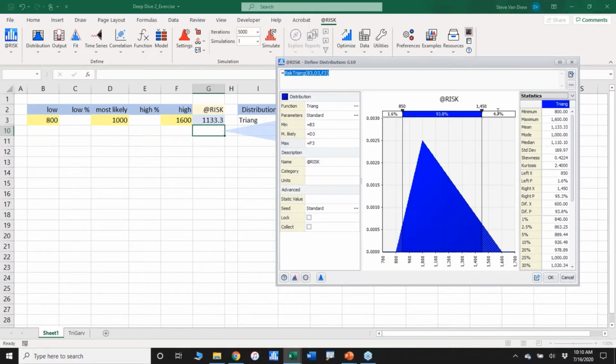Or if I'm curious about what's at the 10th percent, with 10% in the upper tail, I change that to 10%, and since we've specified it that way, it says 1,381, 1.38 million ESLOC is where the 90th percentile is, which leaves 10% in the tail. You also get along the right-hand side a lot of the characteristics of this distribution.